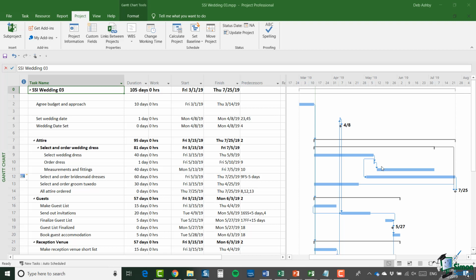When you look at the Gantt chart, such as this one, you're primarily looking at tasks. The table on the left gives information about the tasks, and the chart on the right gives a graphical representation of the scheduling of the tasks, their durations, dependencies, and so on. Now, tasks and resources are basically the two building blocks of a project in Microsoft Project 2019. And we link the two together using what are called assignments or resource assignments.